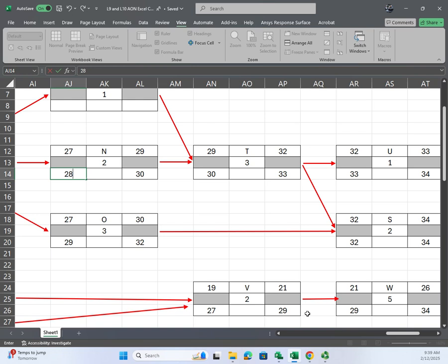Well, okay. This is going to sound really bad. There's no way to fix this without violating a rule, but the rule is that I'm not going to violate it. You can't start something until the other activity is finished. And you can't start S if T still has a week to play. So T's got to be a critical path, but it may not be the critical path. Okay? So I'm going to put 32 in there, but only from sheer frustration at not working.